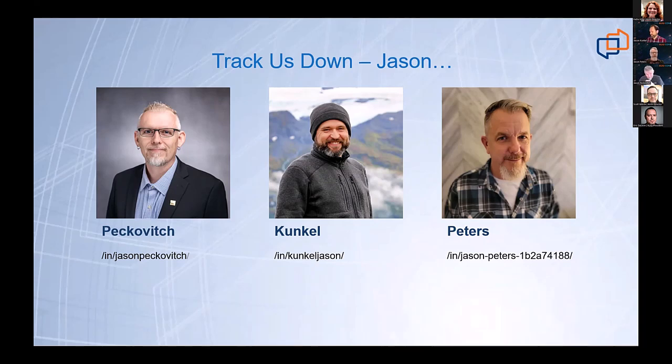Jason and Jason, I'll jump in really quick and give you the gist from Canada. The Canadian version is just with a nicer accent than the other Jason, and it's pretty well the exact same thing. There's so much legal talk and legal itemization about a model and whether it can be the legal document for construction. Up here in Canada, just like Jason was saying, we still need to issue a wet seal on drawings, and it still needs to be sealed, and your specs still need to, at the end of the day, get printed off and put in a binder.